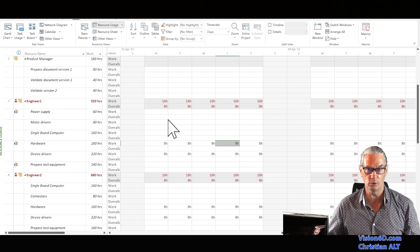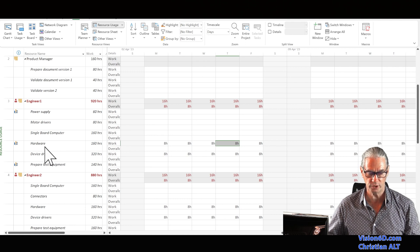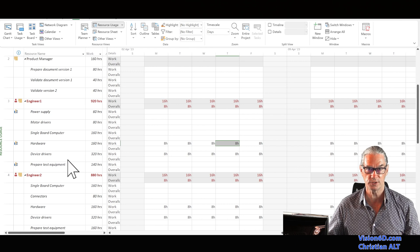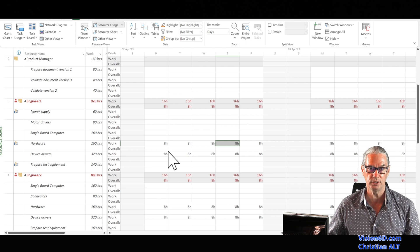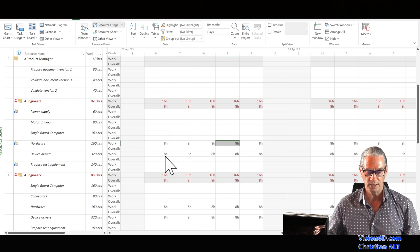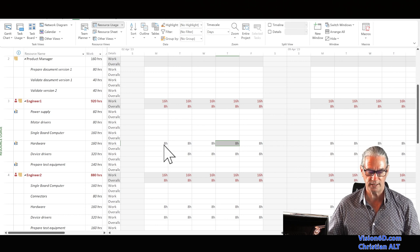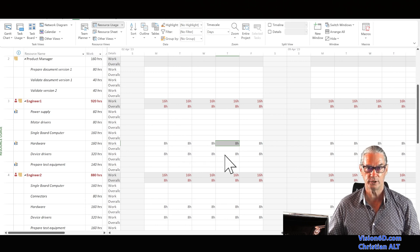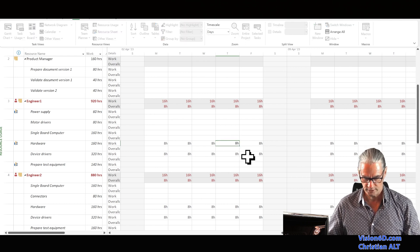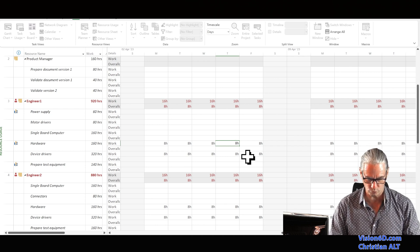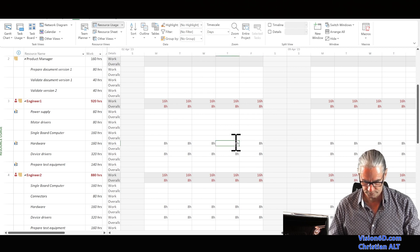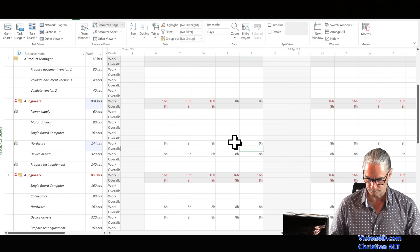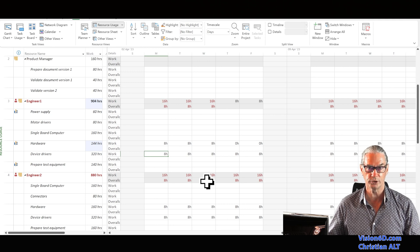For the following week, engineer one is also in over-allocation. He is performing two tasks: hardware development and device driver — the software development. I could reduce to four hours each per day, but switching activities within one day is not always efficient. So I propose he works the three first days just on hardware, and the two last days on device drivers. I enter zero hours for hardware on Thursday and Friday, and zero hours for device drivers on the three first days.